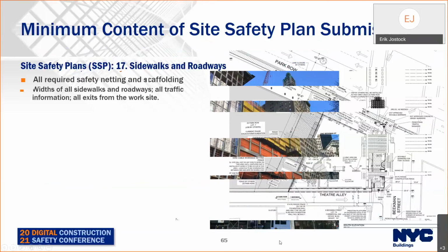Sidewalks and roadways, the SSP must indicate the width of all sidewalks and roadways, all traffic information, and all exits from the work site.